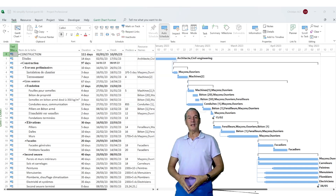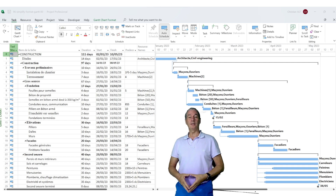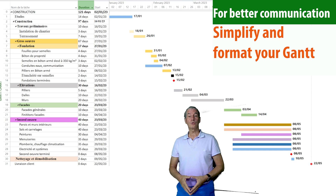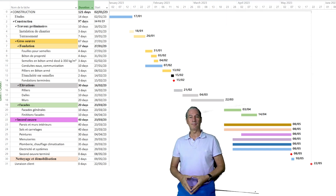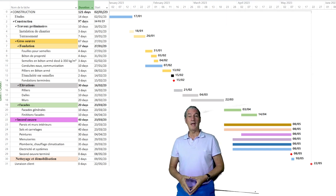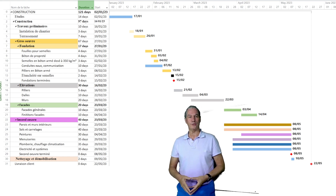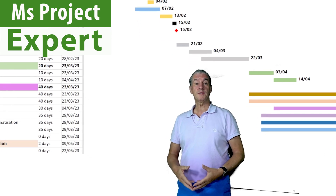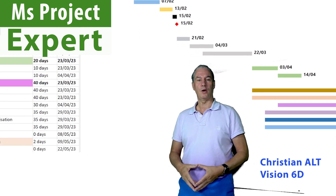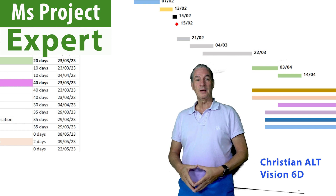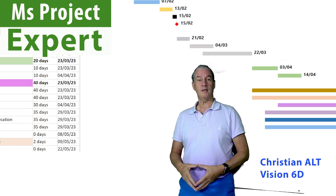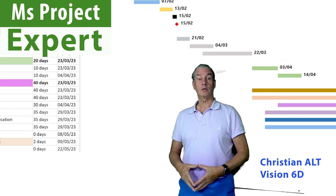Maybe your schedule looks like this, with all the links between the tasks and all resource names. It's often useful to simplify the diagram, to show the end dates and color code the bars according to the stakeholders. This is Christian from Vision6D. I bring my expertise in project management to level up your skills and assist companies.